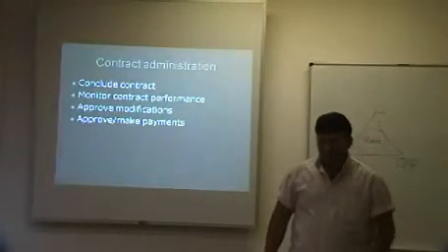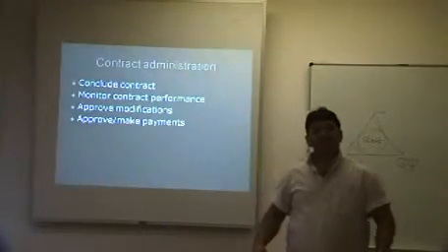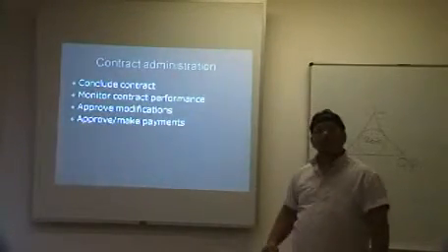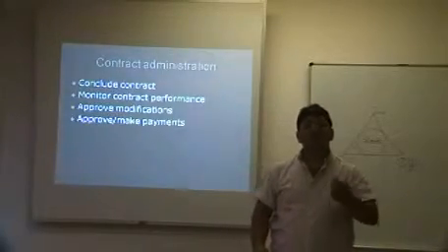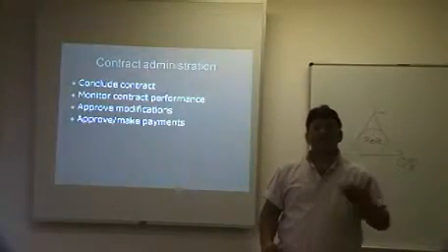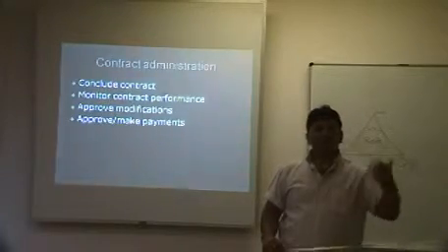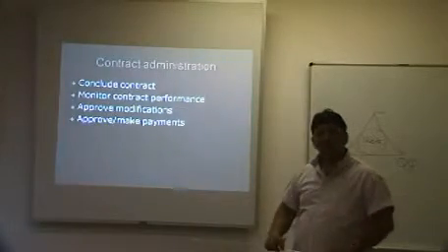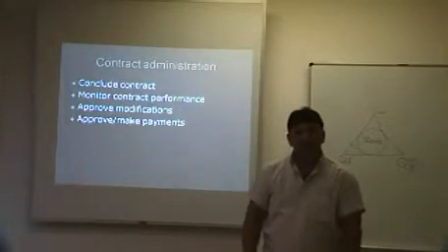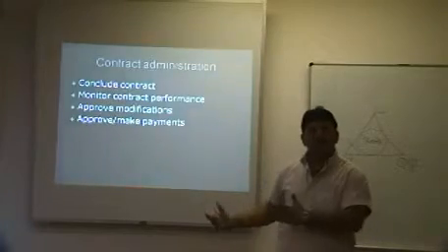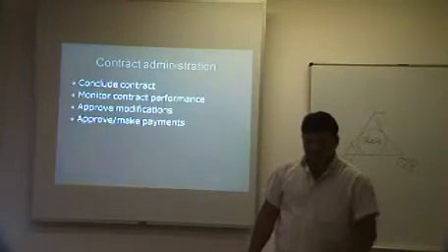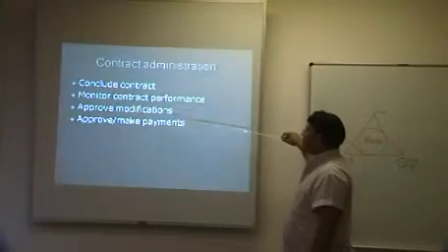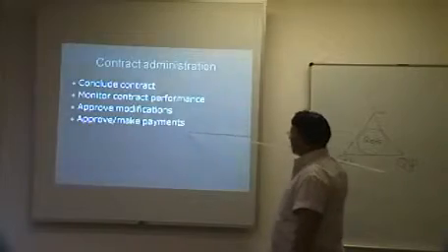Once that is approved, you might need to ask for extra money, or that modification might come from your contingency amount if it's small enough. That's why when we discuss costing and estimating, we said the contingency is very important to look for things like these, if there are any modifications. And if the contingency amount is big enough to cover the modification, then we are covered. Then, after the modification, we will then approve or make payments.